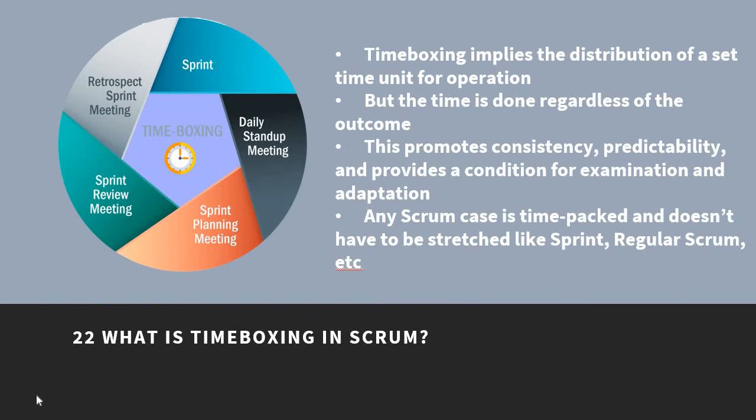What is time boxing in Scrum? Time boxing implies the distribution of a set time unit for operation, but the time is done regardless of the outcome. This promotes consistency, predictability, and provides a condition for the examination and adaptations. All the meetings held in a sprint in Scrum are time bounded. For example, the daily stand-up meeting, the time box is 15 minutes. Any Scrum event is time boxed and doesn't have to stretch, like sprint, regular Scrum, etc.